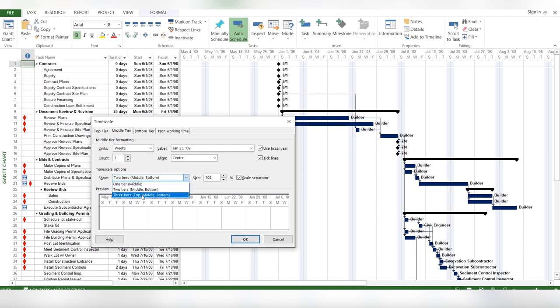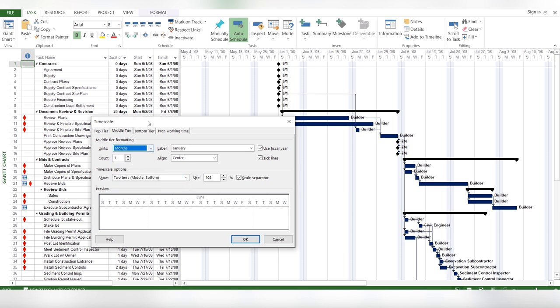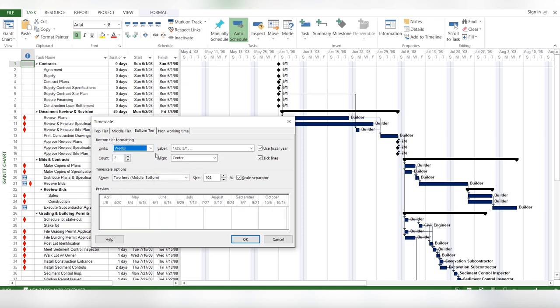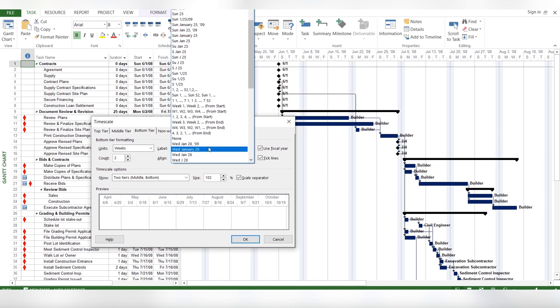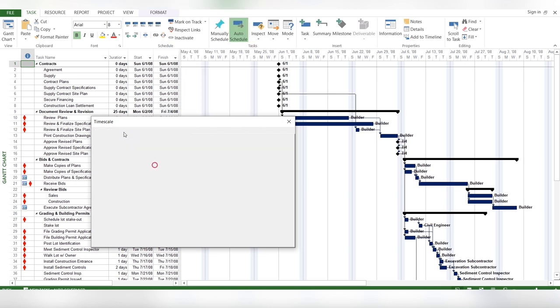Top, middle, and bottom. We can put on the top years information, and then accordingly the lower levels. So I will change the middle tier into months and now on the bottom tier I will change from days to weeks. And you can also change the labels - how your weeks or your months will look like.